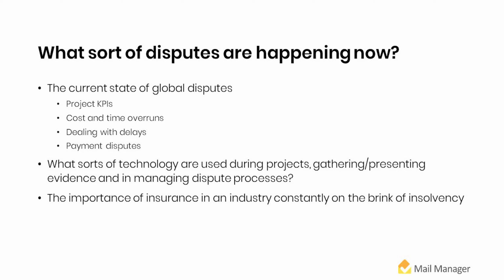And here the big thing is, are you going to be able to call on a bond? So we have a surety bonding process. I assume it's quite similar to the UK. And people are looking to call on performance bonds if there's a contractor insolvency, or if there's a non-payment, they may be looking to call on a labor and material payment bond. And similar to what Rob said, it's not always the case that the surety will step in as expected. And if there is a case for an insurer to step in on behalf of an architect or an engineer, again, they'll typically represent them, but it's not guaranteed that you will have a response.